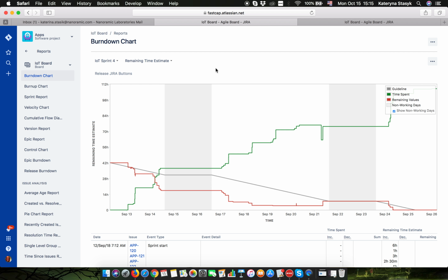They have to log their time 2 times a day as they go gradually. This is very important because if they don't, this will screw up your Burndown chart and it will give you no information whatsoever. In this case, we start our Burndown chart with the hours marks on the left side and days at the bottom. This point, I will get to later.